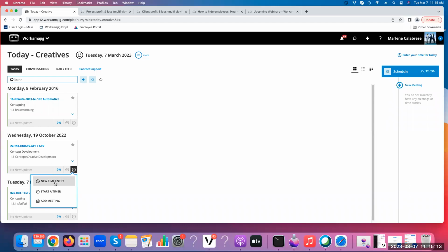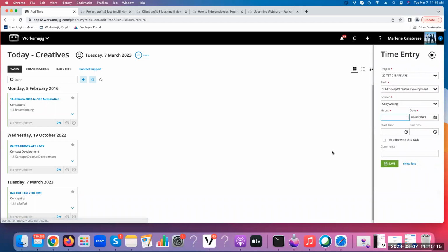So I'm going to say new time entry, and you're going to see that everything is populated for me as far as these required fields, except for the number of hours I worked. So that we don't know. You have to tell us how many hours you worked, but I need to know that it's the right project. I need to know that they're picking the right task. That way, when I look at budgets by task, that's accurate. And then I need, most importantly, to know that they're hitting the right service.